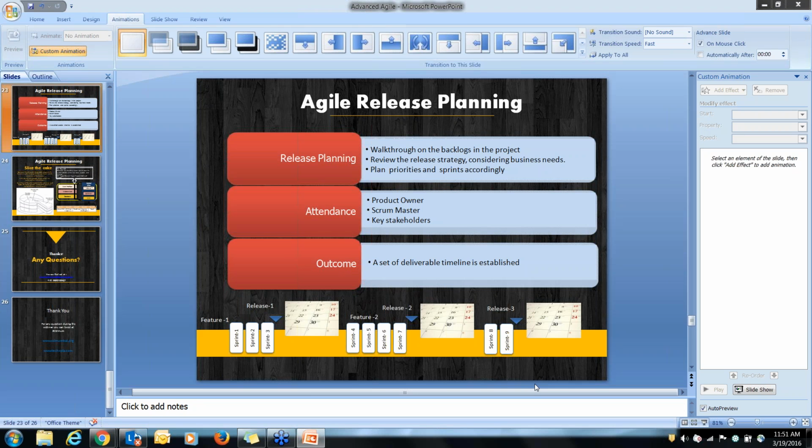For example, you're saying you have to extend sprint 3, accepted, but this should not come into the picture only at the end, when you are nearing the completion of sprint 3. It should have been monitored even at the start of the sprint, because that's why Scrum Masters are there in the team, to understand how the team is progressing and if there are any roadblocks or impediments.